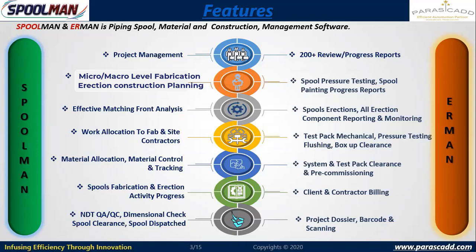If a few valves are not erected, these are all the valves belonging to this particular line, and they are not erected. And these are all the components, certain few components, even for that material is not available, which I have to expedite so that this very big system can be completed. So to complete this system on priority, these are all the backlogs. That is, these are all the material constraints. These are all the progress constraints, which can be focused in detail.